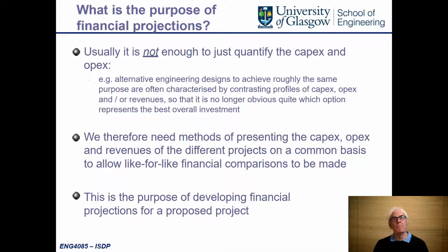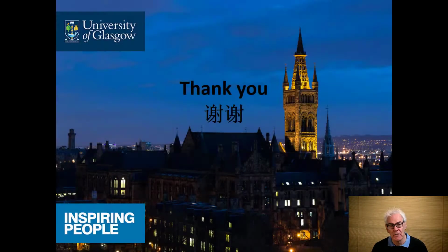You need to be able to compare and contrast between different projects and different ways of doing the same project. There might be a different method of construction of, say, a bridge. You can construct it from steel, you can construct it from stone, you can construct it from wood, you can construct it from many different materials, and each will have a different CapEx and a different OpEx. So therefore we need methods of being able to present the model here for CapEx and OpEx and allow us to make a like-with-like comparison. And this is a key part of financial projections for projects.